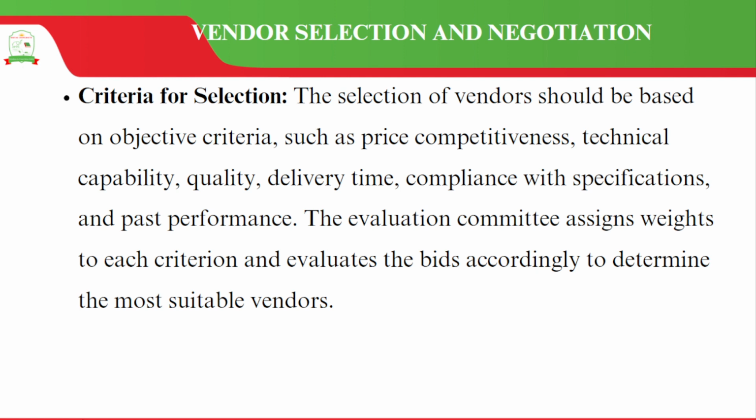We could be looking at the technical capabilities, quality, delivery time, compliance with various specifications, and past performance. And also the evaluation committee is going to assign weights to each criterion, and evaluate the bids accordingly to determine the most suitable vendors.